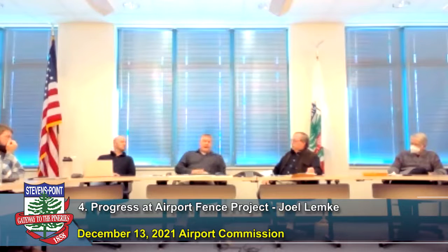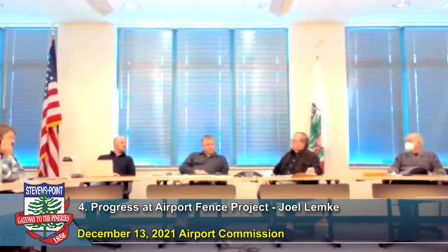So who would be out there? You and? Jason and I, from a staff perspective, are the ones who spent time out there. What we do is mark, let the on-site project manager know what we've done, and then make sure they have a conversation with the guy running the big equipment to say, here's what needs to be avoided if possible. And it's really that simple.